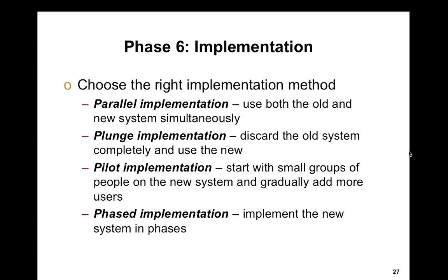The next approach is the exact opposite. The plunge, or you could call it a direct turnover. You discard the old system and you put the brand new one in and you replace it immediately. Obviously, the risk-averse people don't like that one because if it's an accounting program, you're down. Nothing's getting done because the new system's broken. You took away the old system. They don't have any access to it anymore.